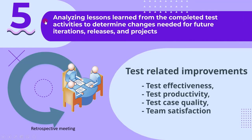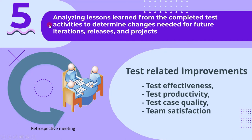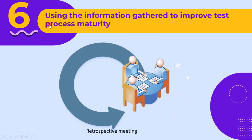The fifth activity is analyzing lessons learned from the completed test activities to determine changes needed for future iterations, releases, and projects. Since the testing activities are finished, we may now know the strengths and weaknesses of the team. During test closure meetings, the lessons learned and test-related improvement points are discussed, and all the improvement points are recorded.